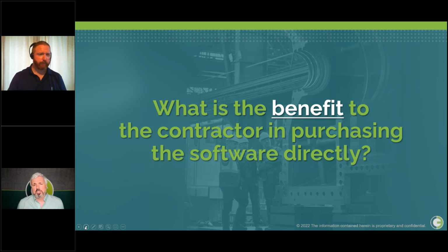The second reason is more technology focused. Most contractors will operate multiple systems on a project. You have a materials management system, scheduling software, document management, completion software. And AWP, when it's implemented correctly, is the hub in the wheel linking all this data together. Right? You heard a lot about the data side today from Duncan's presentation. But being able to connect all this data together is a critical part of AWP.